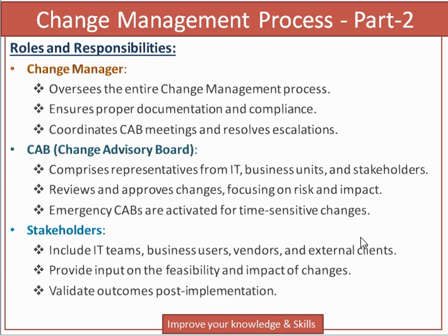comprises representatives from IT, business unit and stakeholder, reviews and approves changes focusing on the risk impact. Emergency CAB are activated for time sensitive changes. Stakeholders include IT team, business user, vendor, external clients, and provide input on the feasibility and impact of changes, validate outcome post implementation.